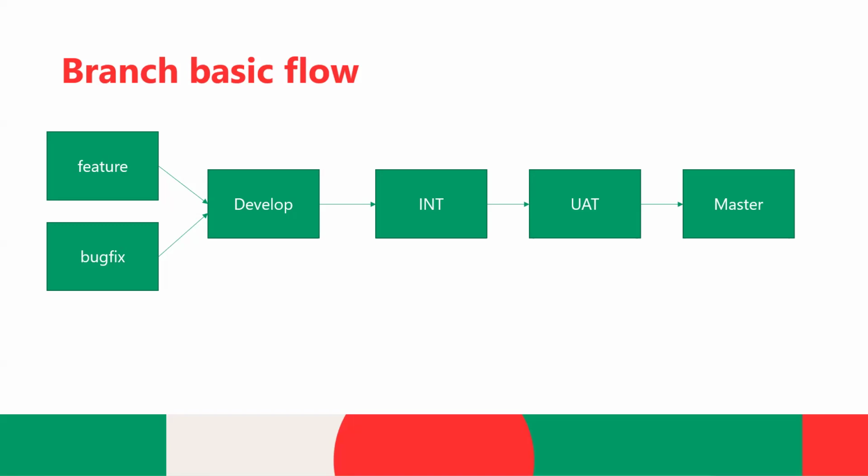Okay, now what we will do, we will cut one branch from that sprint 5, and we will consider that branch as a release branch for our production deployment. Release branch means that it is utilized for our production deployment. Okay. In some projects, they directly go with the normal flow. After let's say sprint 5, there will be a production deployment. It means all sprint 5 code is present in UAT. So this UAT will be considered as a release branch for that project, and it will be used for the production deployment.